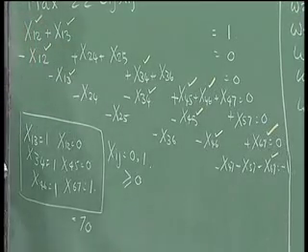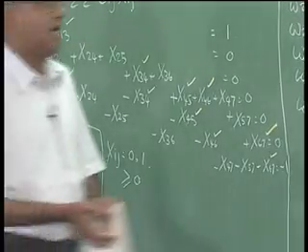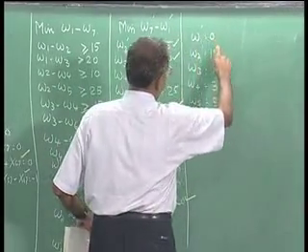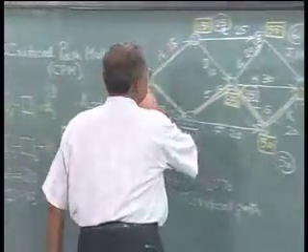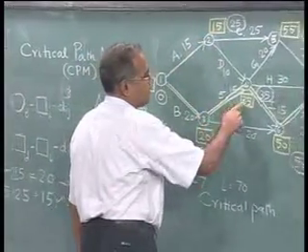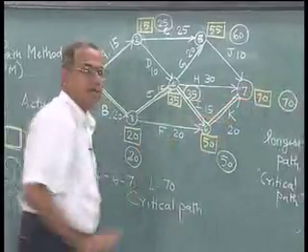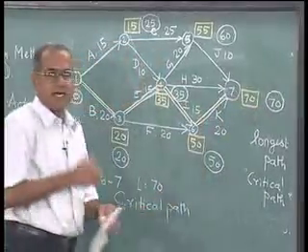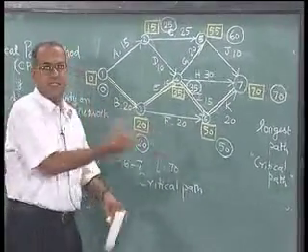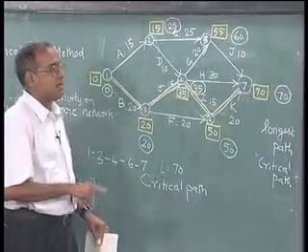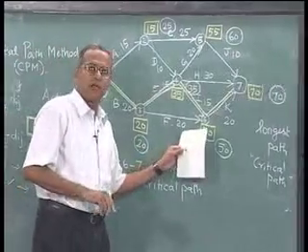Now this also shows that whatever we computed as 0, 15, 20, 35, 55, 50, 70 are the labels that we have here. So when we write the dual, the algorithm that we developed here, which was actually the modification where we updated the largest value instead of the smallest, is optimal to this particular problem.